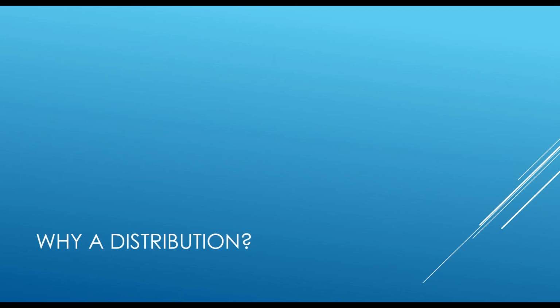When we talk about distributions, and for those that are just browsing, what we do typically is we have input distributions that represent the uncertainty in our data, and then we draw random values from those input distributions, run simulations, basically plug in random values into our spreadsheet based on those input distributions, and we then get a new distribution of outputs with our specific output variables that we're curious about. And I will show some simulations, but it'll be later on in the presentation.